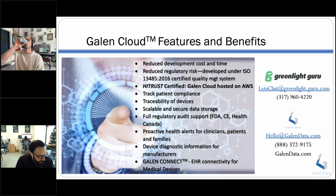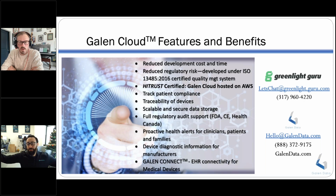The one thing you brought up earlier about key opinion leaders and podium time and the different sites you use, and sometimes those folks who are maybe going to spend a lot of time on the podium aren't going to be your highest enrollers. Can you talk through, from a clinical perspective, what are some of the big cost drivers of a clinical study? Because spoiler alert, for everyone, the reason I ask this is because enrollment time and the length of it is certainly going to drive your cost way up. And so what are some of the other ones in your experience that are like, boy, if you miss this, it's going to drive the cost of that clinical study up?